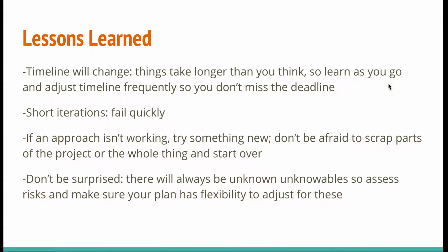Short iterations fail quickly. In the first week or two of executing this, I tried to approach it by sorting everything in the room into keep, trash, and donate piles, and then start organizing the corners. And that was just crazy, because there was no space in the room whatsoever to move around.